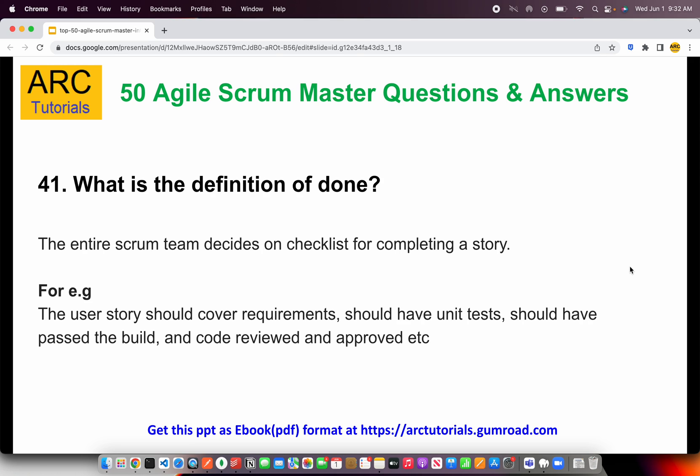The checklist varies: it should have all requirements covered, it should have unit tests, end-to-end tests, it should pass the build, code review should be done, QA should be done, and finally it should be deployed. These are the standard checklist points that are covered in a story.